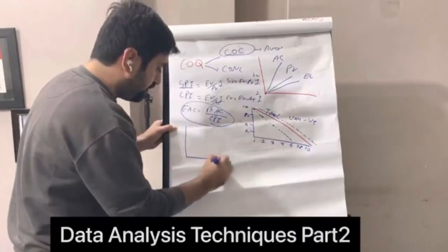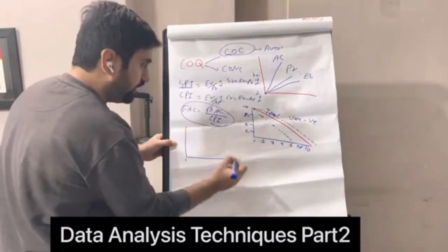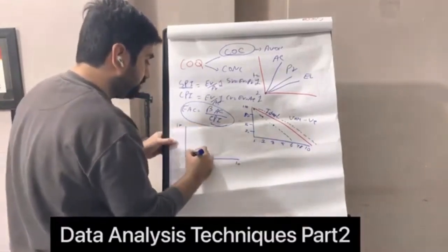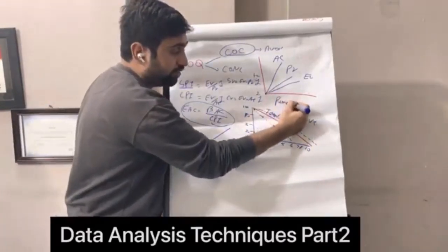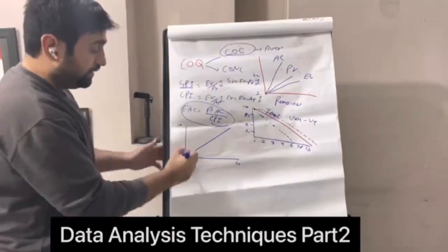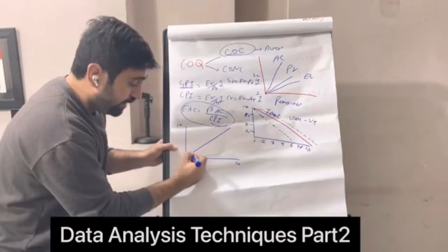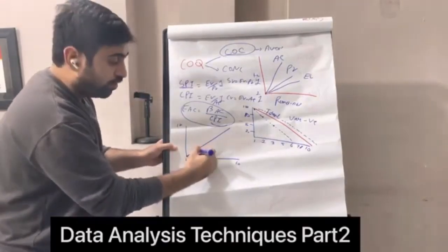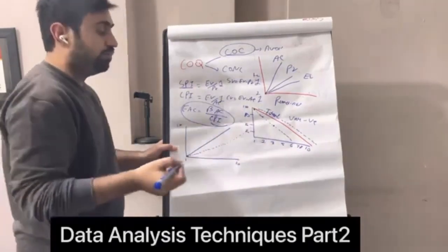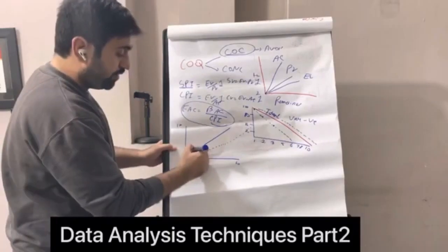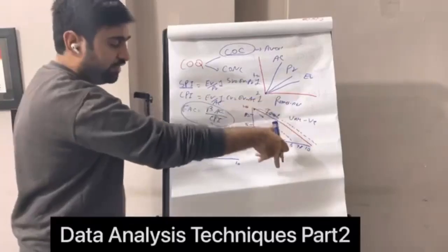Similarly, we have the burn up chart. Burn up chart is basically a reverse of the burn down chart. It shows how much work we have done, while this shows how much work is remaining. As we move up, if we are on the downside, this means we will not be able to complete the work. If I extrapolate it, we need more time to complete the work. If the graph is on the upside, this means we will be able to complete it earlier. Exactly the reverse.